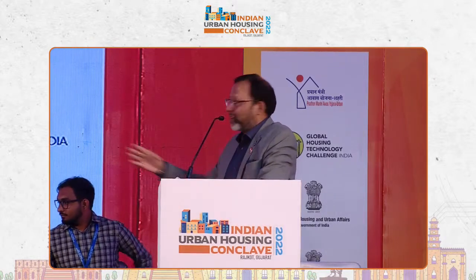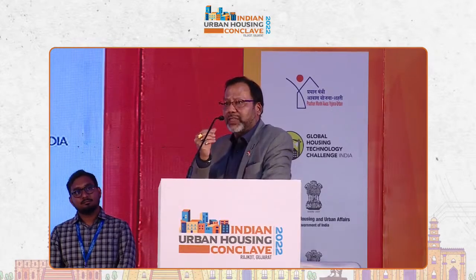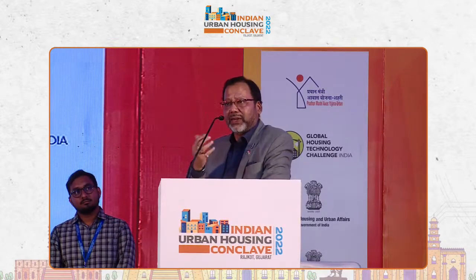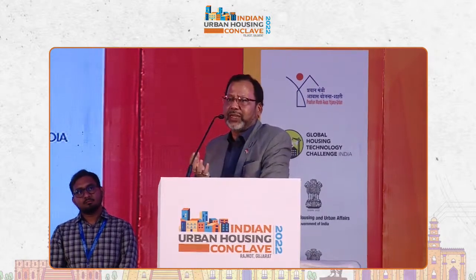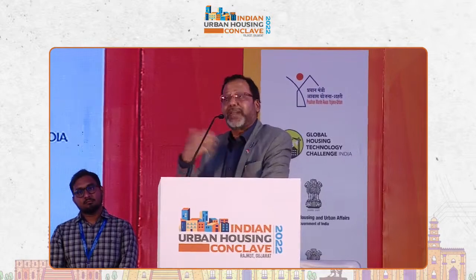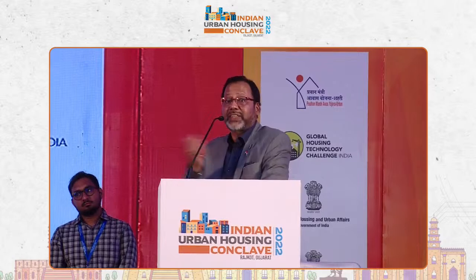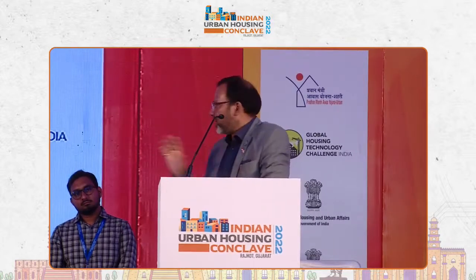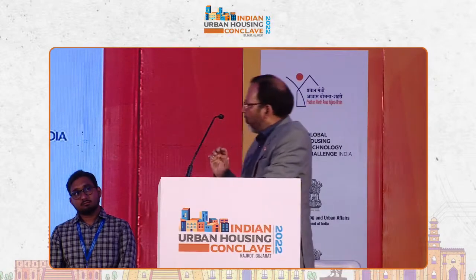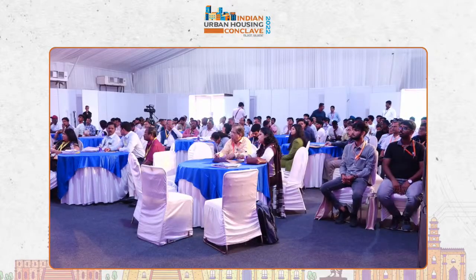Just to answer what Hitesh sir was telling, for innovative technologies, recently CPWD has come out with another manual, on design and build basis, where you freeze the specification and then do the tender on design and build basis. They have come out with a detailed user's manual on how to do a tender on design build basis. Design build basis means you just quote the rate per square feet or per dwelling unit. So to counter a schedule of rates, you can go for that approach, and that is now being approved.